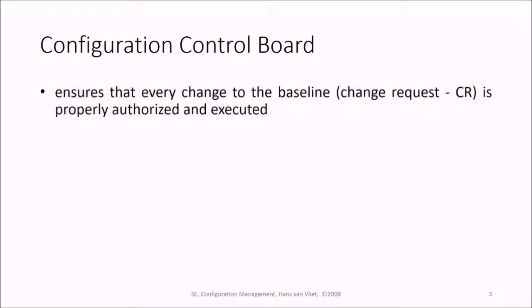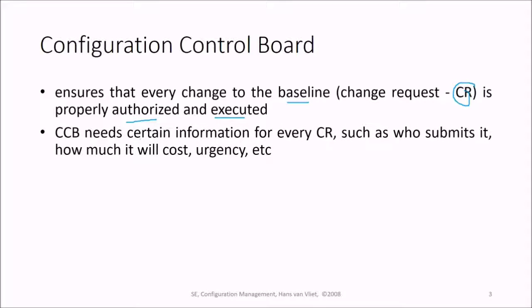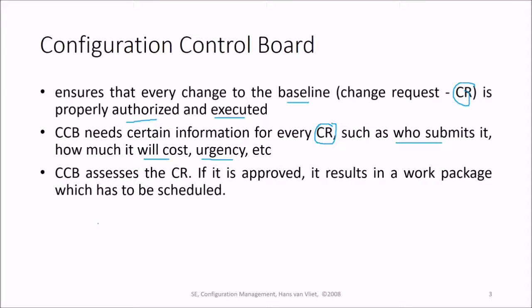What is CCB then? CCB ensures that every change to the baseline, that is change request CR, is properly authorized and then executed. CCB needs certain information from every change request, such as who is submitting it, how much it is going to cost, and the urgency, priority, etc. CCB assesses the CR, that is the change request. If it is approved, it results in a work package which has to be scheduled.